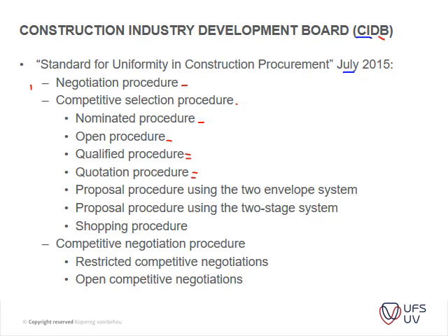Also, usually something like a competition is run, and the best design and cost efficient procurement is used. This procedure is done quite often in America, where they've got a bid system, basically. So the client would put out a need, and then it is for the contractor to do the design and the costing for that.